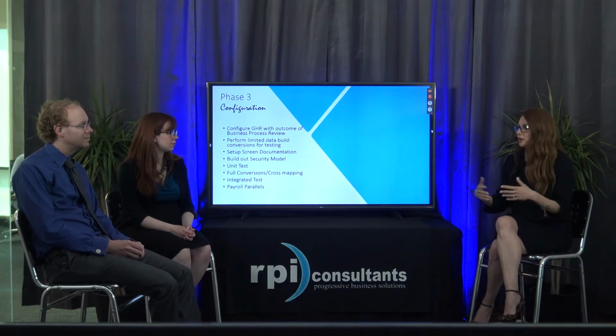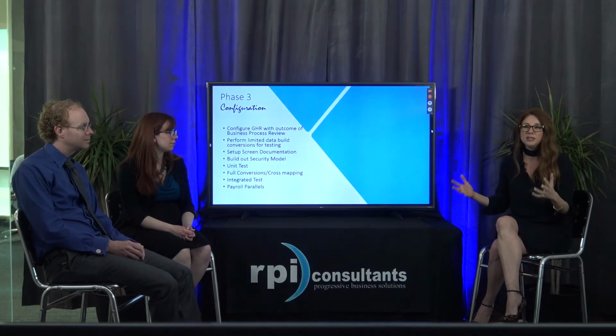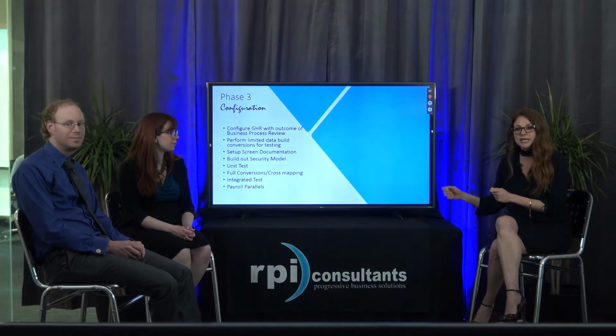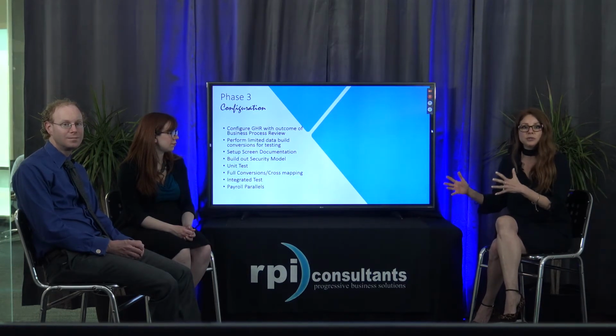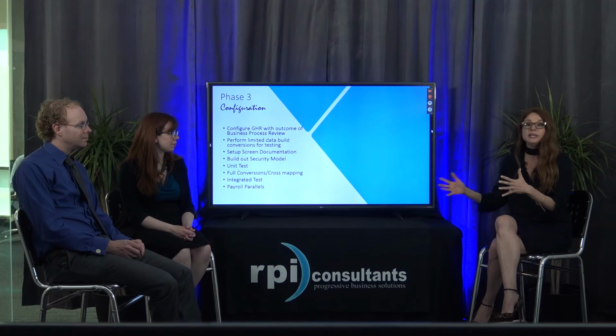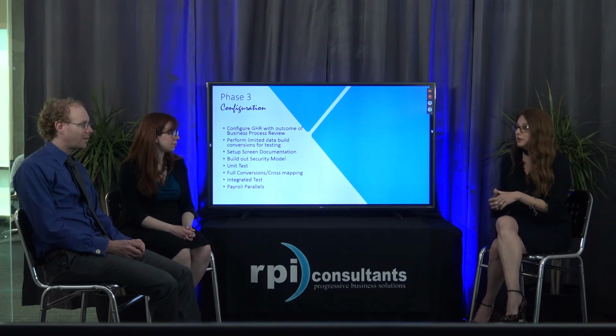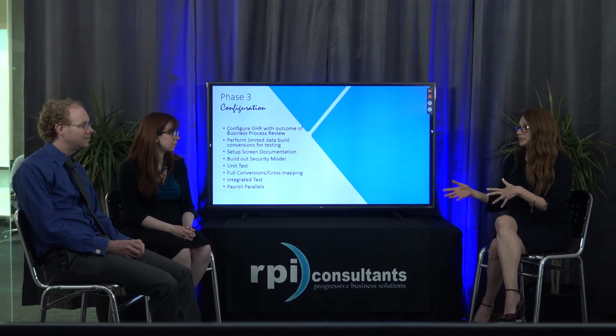So we're not bringing everybody over, let's just bring a sample of 50 people, 20 people, something really light, plug them in and put them through with data that your organization expects to see and can validate, so that these processes go through and you're seeing true, it is working the way you expect it to work. At this point, full conversion is not happening yet.